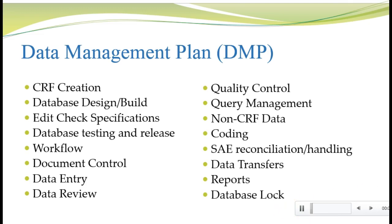Let's take a deeper look at the data management plan, or DMP. The data management plan needs to address the work that will be performed, who will do that work, what SOPs or guidelines are going to apply, and what documentation or output will be produced or collected. Prashka includes an excellent outline of a comprehensive data management plan in Appendix A, so you'll be reviewing that as part of your assigned reading. As a quick reference, the DMP should include all of the following items.